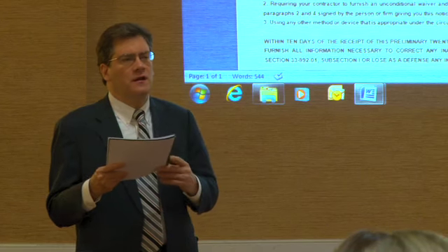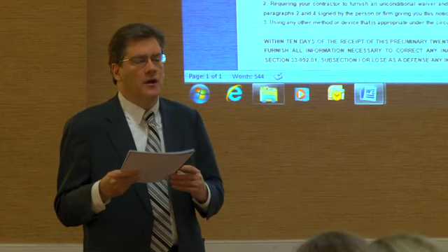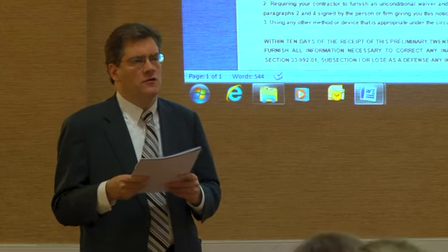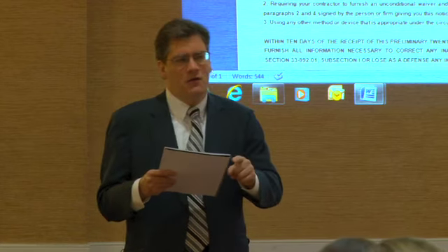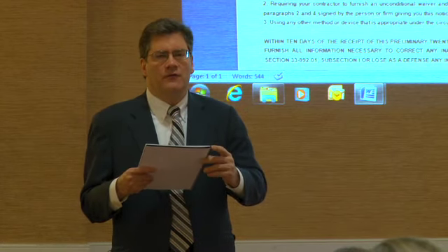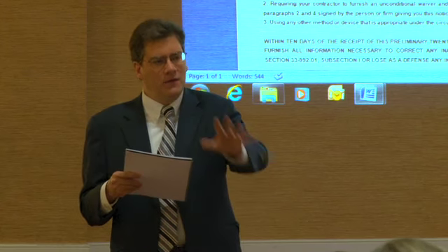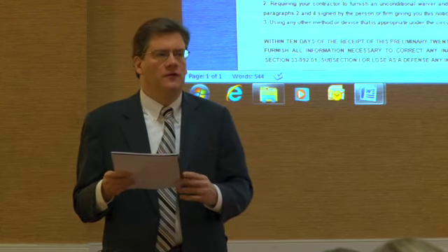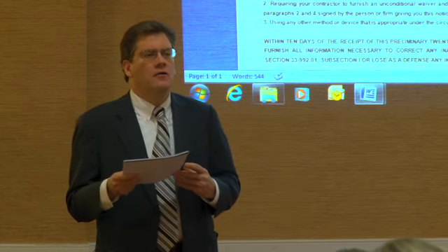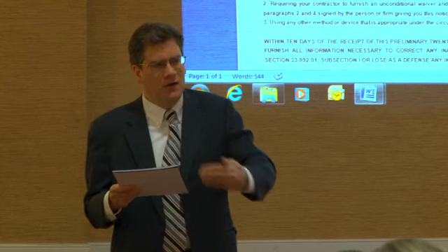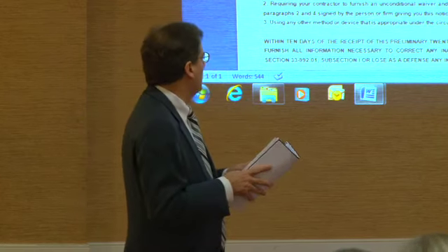Now, the information in that 90-day letter should be accurate as to who the surety is. But if you wanted the best information you had, as long as you put the general contractor on notice of the fact that this is a payment bond claim, and we know the payment bond that we're talking about, then that should be sufficient. You have a lot of maneuvering room in your situation. The big thing is to hit the timelines. Okay? All right. So that's what a preliminary notice looks like.